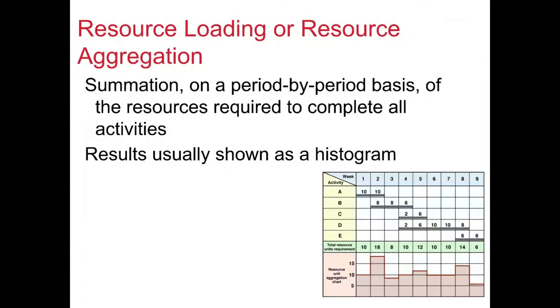So we use a technique which is called resource loading or resource aggregation, which is essentially a summation on a period by period basis of the resources required to complete all activities, and results are shown as a histogram, which you can see here.